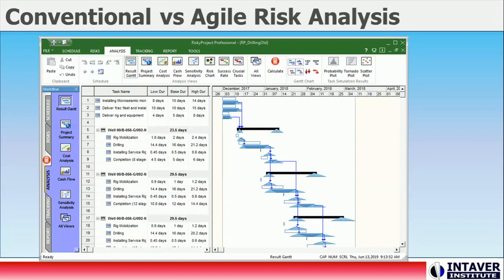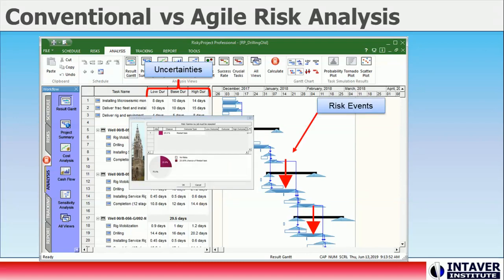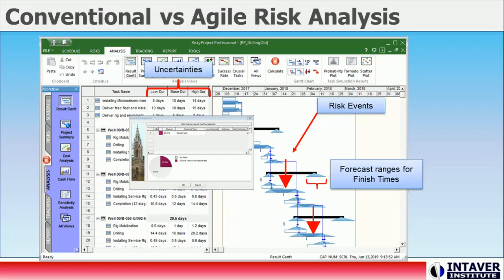Uncertainties are assigned as three-point estimates — low, base, and high — with statistical distributions. Risks are events that can be assigned to activities with the probability of occurring and impacts to cost, schedule, and performance. Simulations generate probabilistic forecasts for schedule and cost. Here we are looking at a Gantt view that presents the results of a schedule risk analysis for each task in the schedule. Using this analysis, project planners can create risk-adjusted plans that account for the level of project risk.